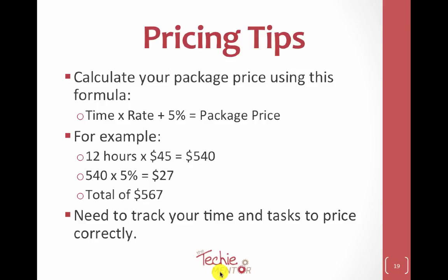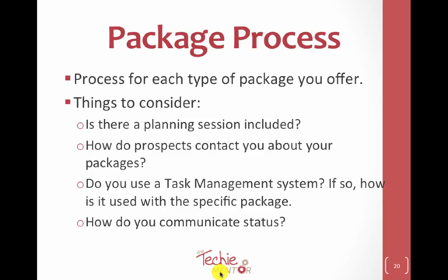And here's your pricing tips. This is the same in everything. Calculate your package price using time by rate plus 5% becomes your package rate. So it's so important for you to understand how long it takes you. So you need to track your time and task price correctly. So I invite you to go back through the modules and track your time as you do a lead page, as you do a sales page, right? As you do an opt-in page to get yourself an idea of how long it takes.